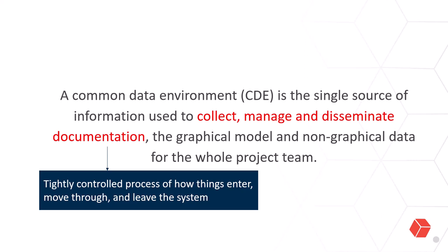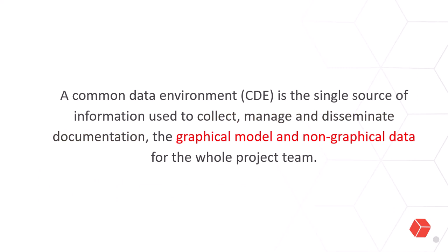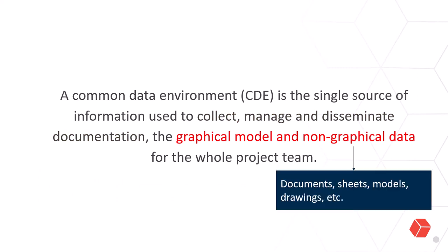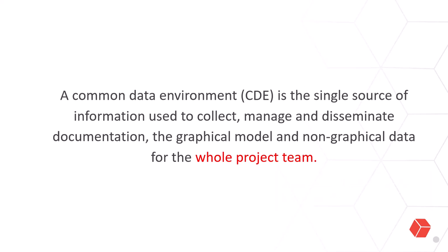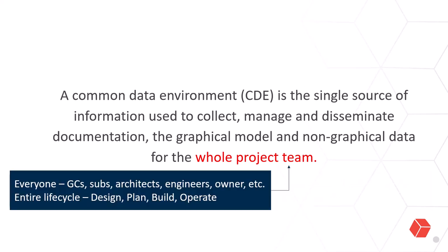So if we think of something like a simple file sharing application like WeTransfer, there really is no tightly controlled processes in that. So something like that would not be considered a common data environment. And then it is for both the graphical and non-graphical data. So yes, it's not just for the architects and consultants and their drawings and models, but it is also for sheet specifications, drawings, and really everything project related, because it should be used by the whole project team.